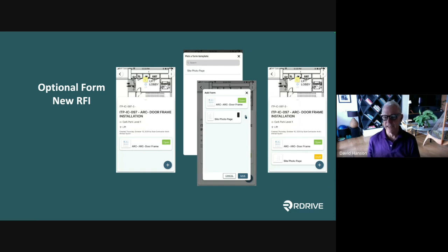And so when I print out the report for the inspection, I'm going to see both the original failed inspection, why it failed, what happened, what comments were there, any attachment that was on the failed inspection, such as a defect or a photo. And now I reopen a new inspection.